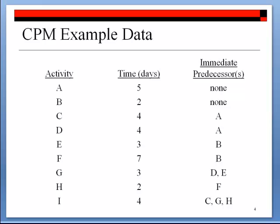This example shows the information we need in CPM. In this project, nine activities along with their activity time and immediate predecessors have been identified after step one of CPM. For instance, activity G needs three days and follows activities D and E immediately. Next, I will show you how to construct a CPM network or precedence diagram, calculate earliest start and finish times, calculate latest start and finish times, determine the slack of each activity, and identify the critical path.